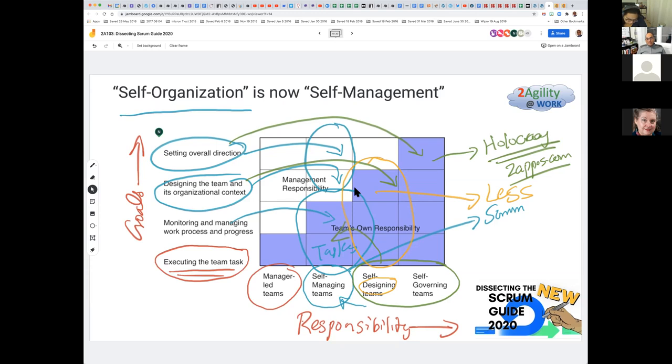And I have teams who have rejected those people. Sometimes the person who's coming in does not have the necessary skill set. One of the fundamentals in Scrum is that the whole team collectively should have all the skills required to do the work, or acquire them. If you're not able to do that, you can't do the work. So if you throw a random person onto the team, the team becomes imbalanced. I've had teams which have totally rejected people joining because they did not have the necessary skill set, nor a necessary pathway to acquire the skill set which was deficient.